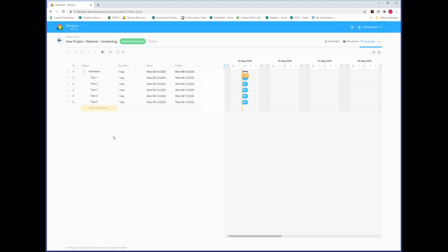Now these are different from the milestones that we have in Tempus already. Our existing milestone functionality is really just a loose floating object that can be used to indicate specific timing inside of the single project allocation grid, the bulk project allocation grid, and the bulk project allocation flat grid. Milestones here are the conventional scheduling milestones. They're an epoch or a moment in time where something should take place, maybe a go live, a decision, something used traditionally in conventional scheduling.